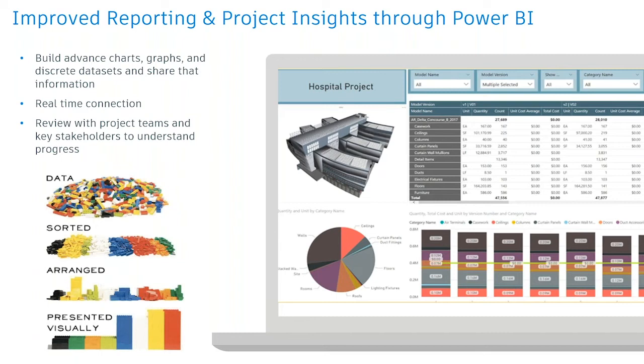This can also be really informative for why is our cost so high? Because we're using a special wall system, and walls make up 50% of our quantity. Either way, these advanced analytics, I think, are overwhelming for some folks, but once you take that step in understanding how this data works and how you can look at it in a new way, I think there's a huge potential here for really anything that you need to see.